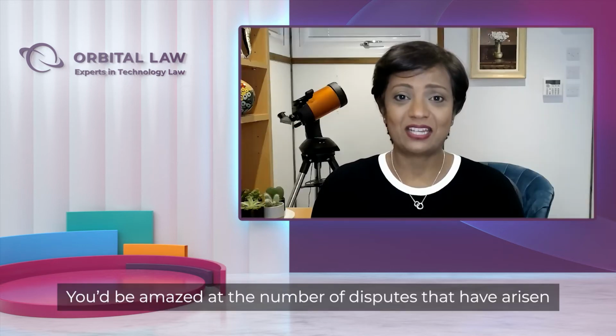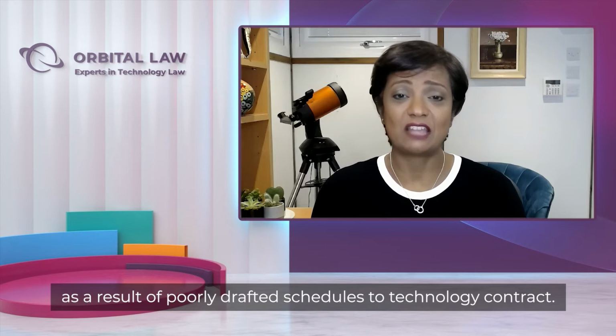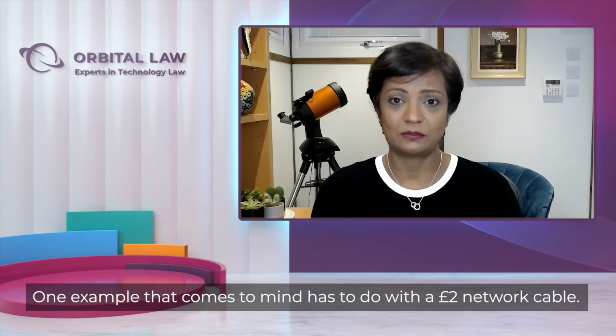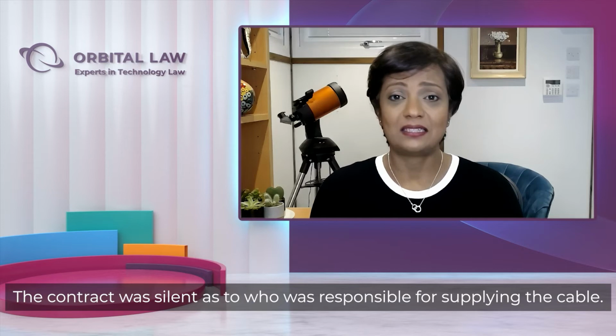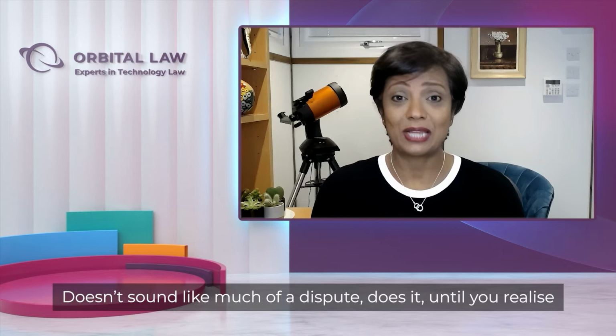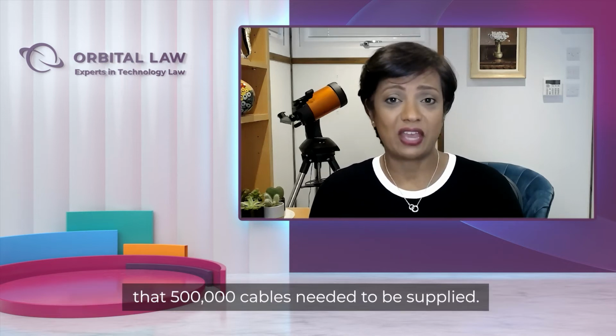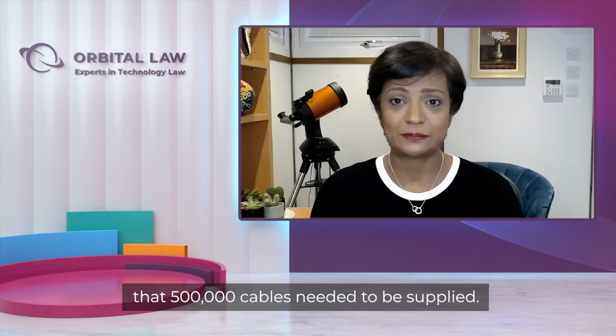You'd be amazed at the number of disputes that have arisen as a result of poorly drafted schedules to technology contracts. One example that comes to mind has to do with a £2 network cable. The contract was silent as to who was responsible for supplying the cable. Doesn't sound like much of a dispute, does it? Until you realize that 500,000 cables needed to be supplied.